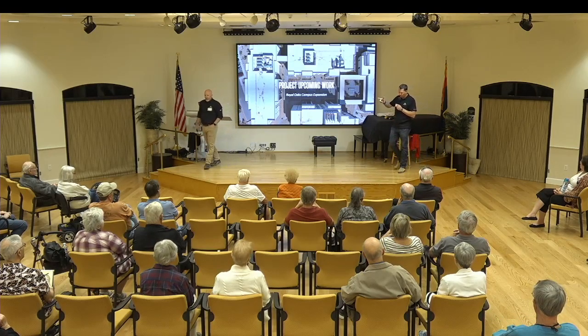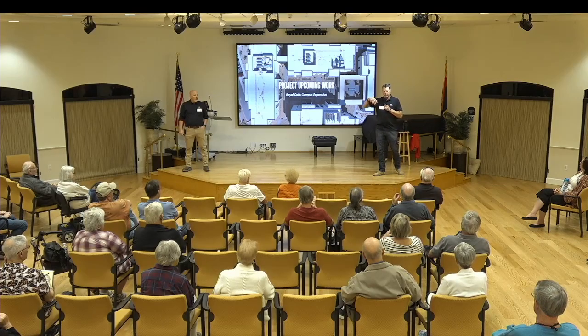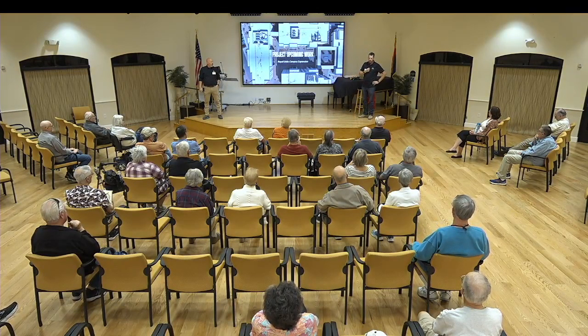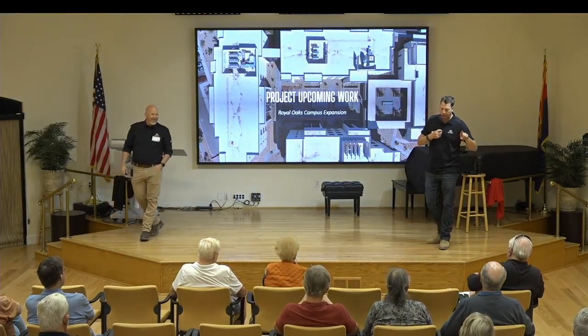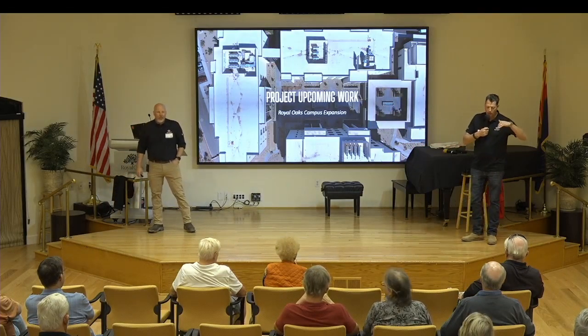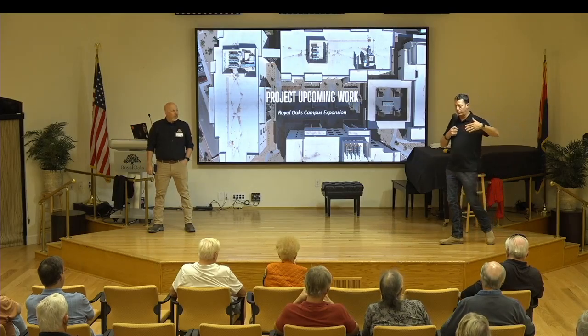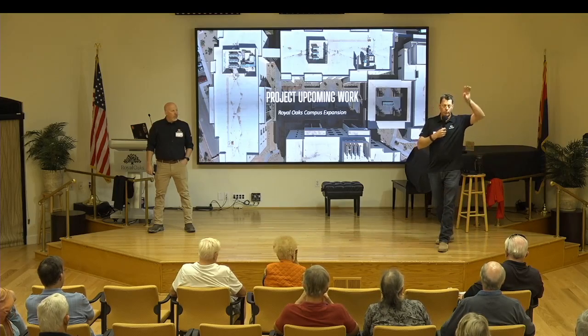So part of our requirements for getting certificate of occupancy was some of the construction being closed or the accessway closed off to the bridge. Well, that was me thinking of how we were going to do something, but then after chatting with Royal Oaks, they said, "This is the only double doors to get into the building. That's how people need to move their stuff in." I thought, "Well, that's a pretty smart idea." So I've already got the blessing from Sun City Fire Department. We're going to modify some of the barricades there. It's going to be on a daily basis because I'm going to have to put some of the security back up where we have to come in and still load stuff up onto the bridge.